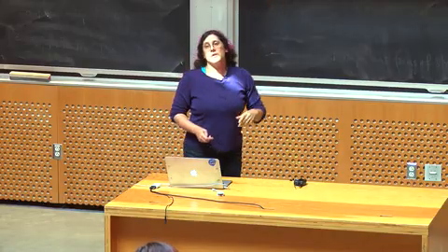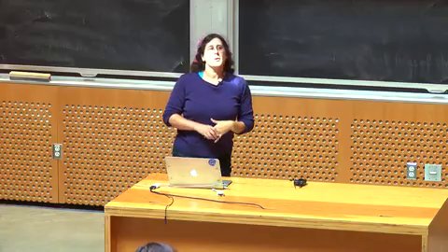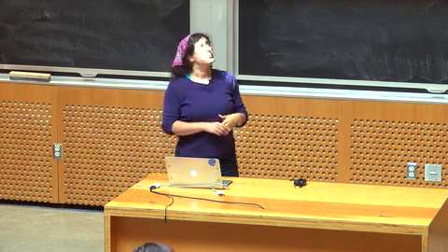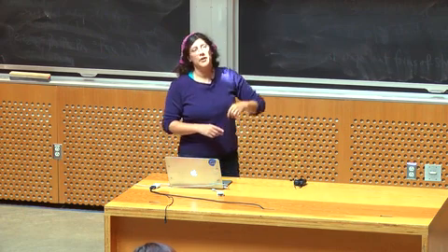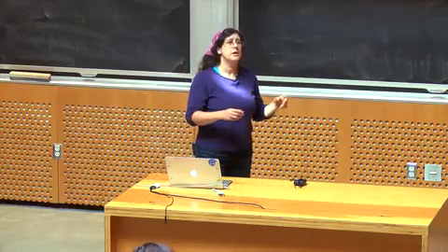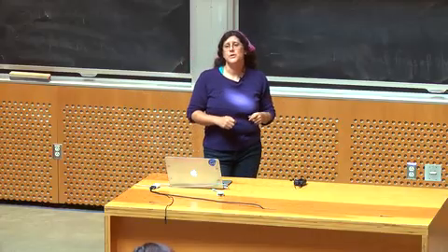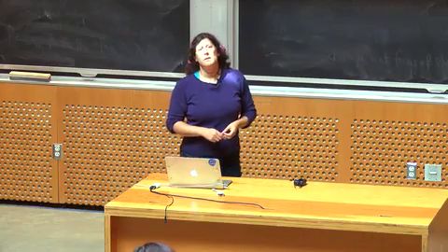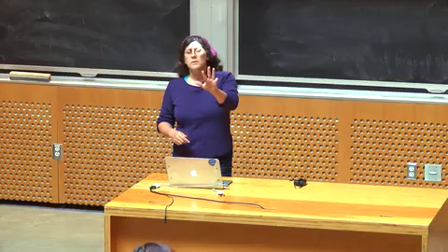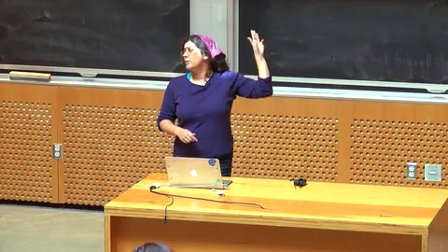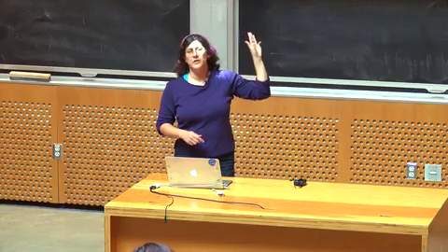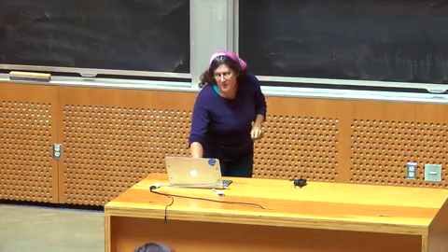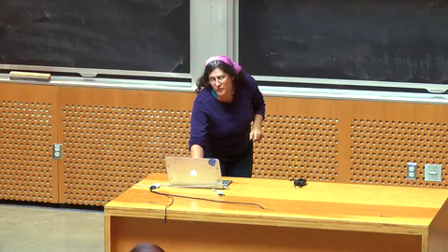Then you need an estimation of how big a job this is. For the product backlog, we don't recommend trying to do really fine estimation. They're using numbers in this backlog. I should make a new one that uses my preferred system, which is just using the words small, medium, large, extra large. And how big is small? I'm not really sure. When you first create your backlog, you won't be sure either. But you can probably tell the difference between a small feature and a medium feature and an extra large feature.